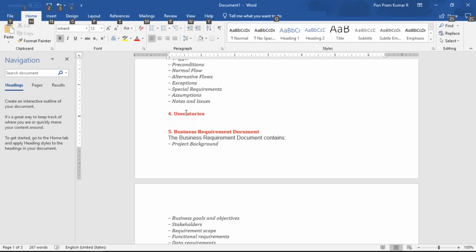Exactly, yes. In a single shot, you cannot cover the whole recommended documents for an e-commerce website. I'm just saying this for an e-commerce related application. So in that moment, you have to break down the work and assign the work on a user story basis. The moment they start working on the homepage, in parallel you'll be working on the user stories related to backend inventory management, product management, how the UI should look, and how the transaction should happen.